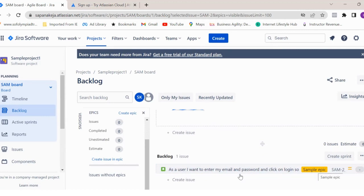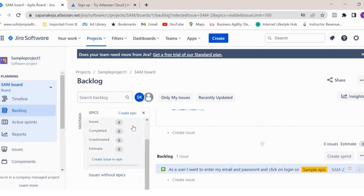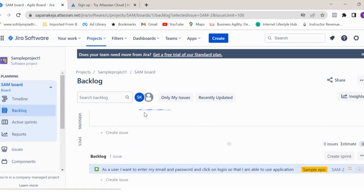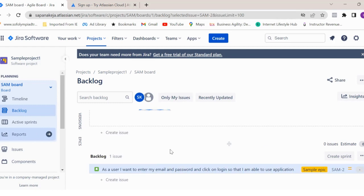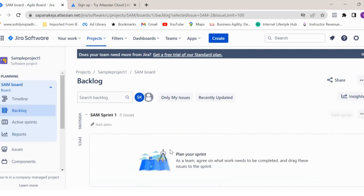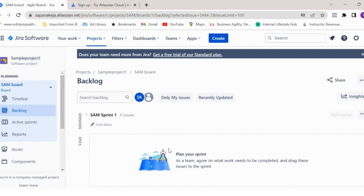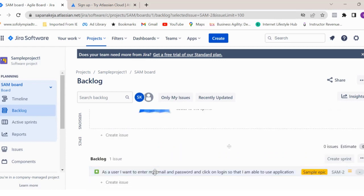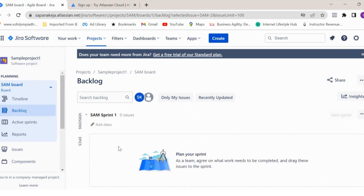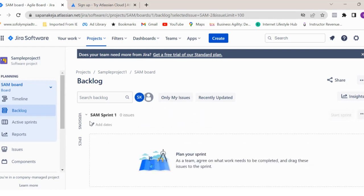So same way, you can create multiple epics, different user stories under those epics, which captures the requirement of your product. Once you have the product backlogs ready, next step is to plan your sprint and to pull your backlogs into your sprint.